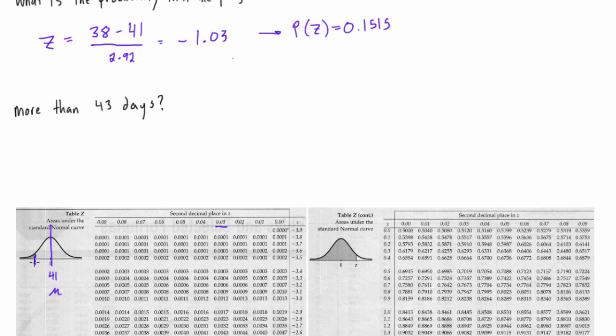And this x value here, that's 38, that's the day that we're looking at. This is actually why we're getting a negative value, because we're looking at 38. If we were looking at a number that was larger than 41, we'd be getting a positive value, hence that this x is on the positive side, that would be 41, where here it's on the smaller side.